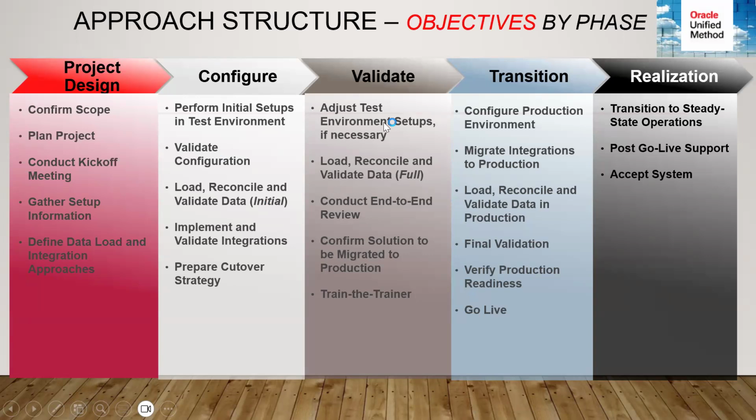Then once everything is done, during this validation, we'll have test scripts and the scenarios that we would be creating for client scenarios. And there would be a SIT for any integrations, and UAT will be conducted for all the configurations that are done, including with the loaded data. So once this is done, then we'll train the trainer, which we call key user trainings, where you would be training business end users.